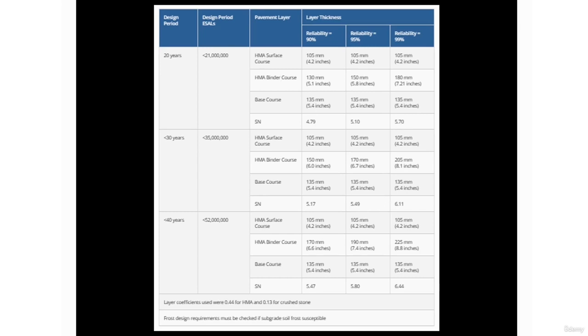And the client will thank you because they can then say, okay, maybe we might be able to ask for more funds because we want it to be 30 years. Since you said 30 years is 60 mil and our budget can only stretch up to 45, they have enough time to go through the bureaucratic processes, because bureaucratic processes take time, to acquire those additional funds so that the project can go on. So this is very important to represent. And it's so simple and clear cut. You don't need to be a civil engineer to understand this.